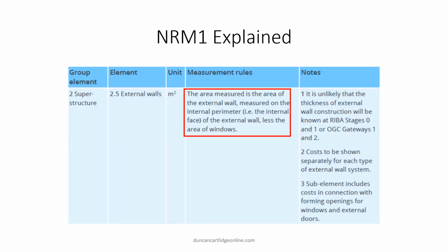Here is another extract from NRM1, Order of Cost Estimates, showing the rules for measuring the element's external walls. Again, measured in square meters, but note measured not on the center line, but the internal face. How a description is framed is covered later in this presentation.